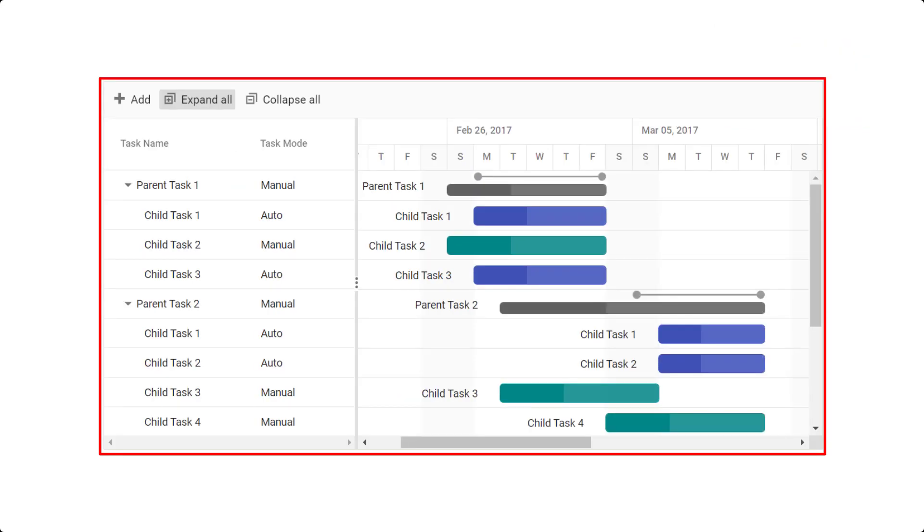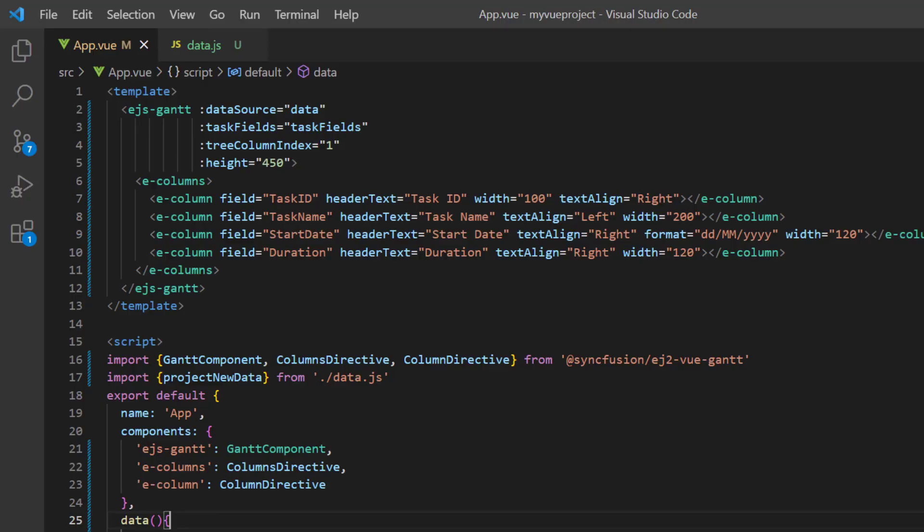you can enable manual validation for certain tasks by mapping the Boolean property taskfields.manual from the data source, while other tasks are validated automatically. Here, I'm going to show both automatic and manual validation using the custom scheduling mode.